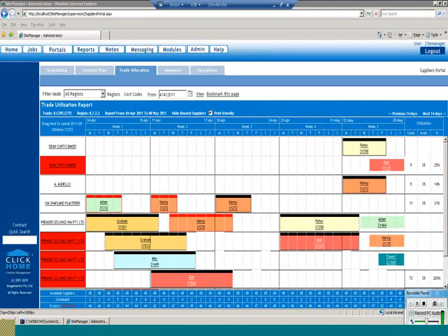Okay. So the first one that we're going to do is the trade allocation screen, which is really centered around suppliers, looking at the work a cross-section of suppliers have within certain cost codes to allow scenarios like a construction manager wants to know which frame carpenters are working in his region, which frame carpenters have work scheduled on the same day, so you can see conflicts, which ones have very little work, which ones are oversubscribed, and to help them resolve those issues with the supervisors.